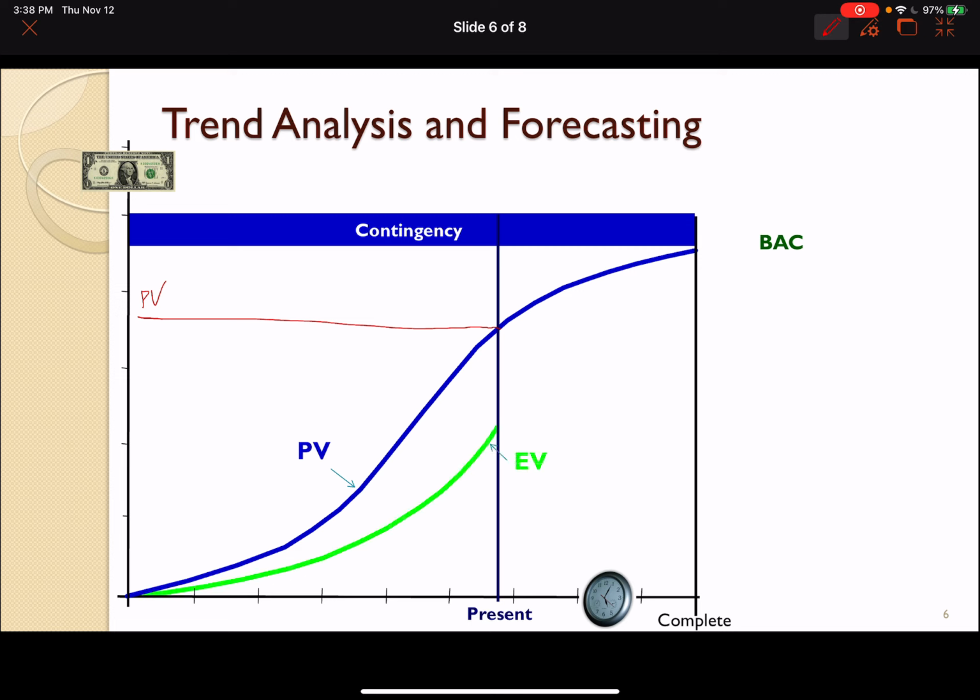able to determine the earned value, and in this case the earned value is below PV, so the difference EV minus PV is negative, which means the project is behind schedule. We planned to do the PV, but we earned less, so it is behind schedule.